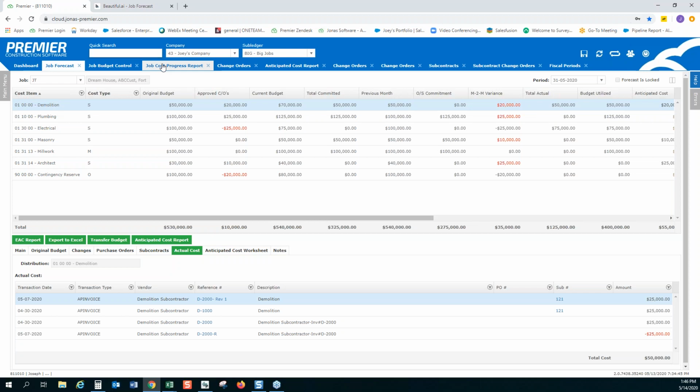So once the anticipated cost has been entered, it should only be sitting there up until that change is finalized via a change order. Once the change order goes in, then the job cost progress report gets updated. So I can understand how some people might feel like it's nice, but we're trying to create that differentiation between that working screen, the job cost forecast, and the job cost progress, which is kind of the solidified, here's-where-it-stands view without the unknown factor.